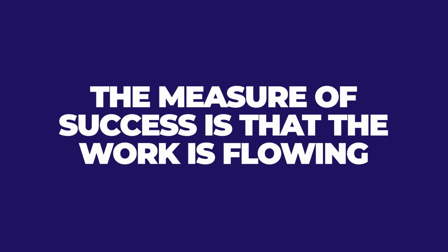That's keeping things busy. But if in those situations you analyze, it would be better for that equipment operator to shut the equipment down, maintain it, fuel it up, help the crew actually work through the problem, keep the work flowing and not the people. That is a better focus. And so a lot of people in construction are like, workers being busy, equipment being busy, don't ever have that equipment being shut off. That is not the measure of success. The measure of success is that the work is flowing.